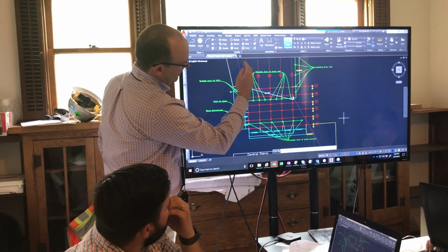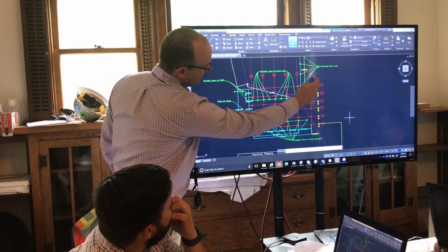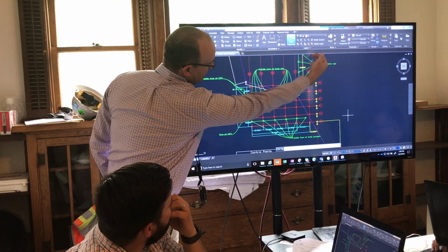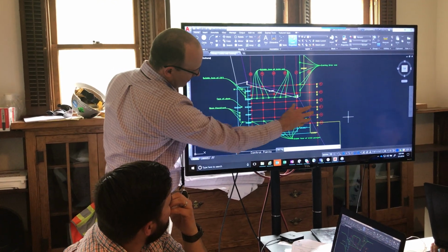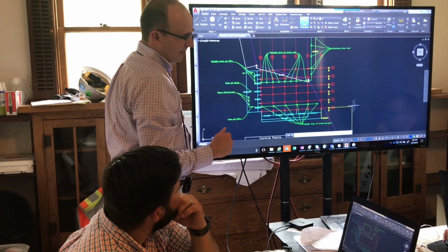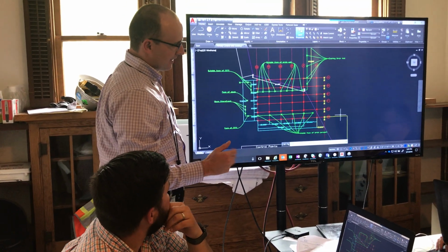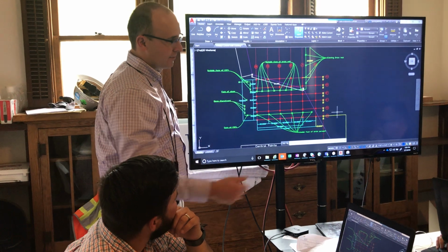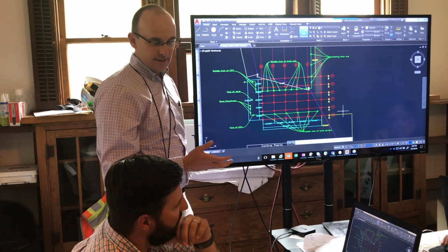Mm-hmm. And then when you're doing these points, exactly what Jake said, to reiterate, if these are all precise, and if this line intersects nicely with this line up here, then everything will fit: the steel will fit, the floor edges will fit, the elevations will fit, and we won't have fee erosion, well, as much fee erosion from having to level floors, having to write an RFI, having to modify the steel, having to drill an epoxy, having to move an embed, things like that.